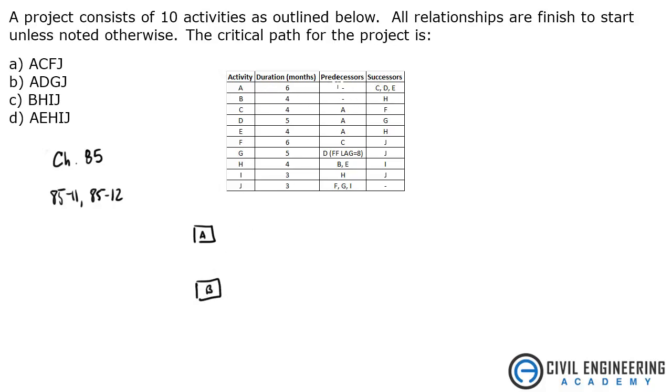Okay, its successors to A are C, D, and E. So we're going to have a C, D, E, C, D, E. To B, there's an H. I'll draw that over here.